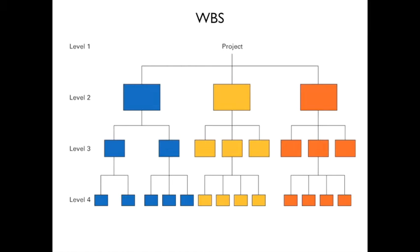Here's an example WBS. You start at the top with the project, and identify three logical pieces — say a computer, software, and user interface. The computer breaks into monitor and processor. Software breaks into requirements, coding, and testing. The user interface breaks into prototyping, working with users, and the final interface. You keep breaking the project down into pieces — that's a work breakdown structure.